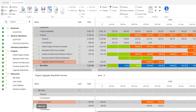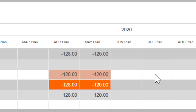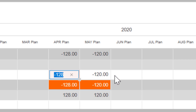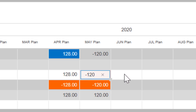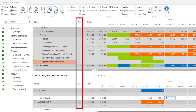Let's return to the plan and commit hours to Bill White on the Upgrade SharePoint Servers project. In addition to the copy and paste functionality, you can drag a selection using the anchor at the bottom right corner of your selection to copy your data to immediately above or below your selection. To edit your cells, you can double-click the cell to edit it, or similar to Excel, press the F2 function key to enter edit mode, make your change, and then press Enter or the Tab key. There is also a column titled Auto that has a checkbox next to projects that you can select — this will automatically commit requests. You might consider using this feature if there is a high-priority project that needs its requests satisfied first.